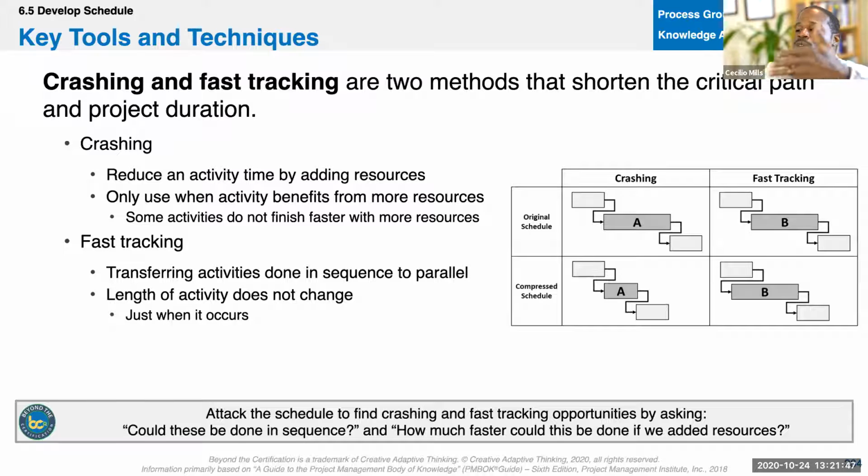Well, if you decide to do all 4 phases at the same time, then you can compress that total schedule down. Does that make sense? Yeah. So fast tracking really only works as a true total schedule compression technique if you have multiple phases. If you don't, then you're really just increasing risk for no reason, because you have a critical path that needs to be followed. So just keep that in mind too.